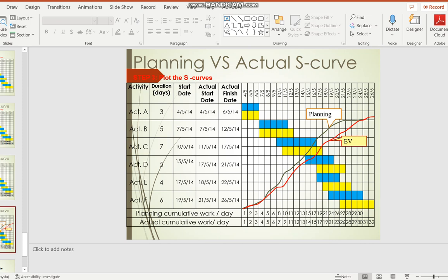This is called PV. Okay, PV. So you've already done your PV, and your PV is this blue. So this blue is the line you've drawn. It's all cleared, all beautifully mapped out. Then let's say at day 14, you draw a line. Your client wants to know, today is day 14, I want to know your progress, and immediately you need to detect: are we in delay or are we actually on time?